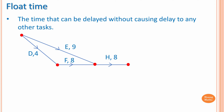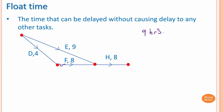Let's have a look at a section of a network. To start activity H, we need to complete activity E and activity F. To complete activity E, we need nine hours — assume these activities are in hours. To complete activity F, we need to complete activity D first. Activity F takes eight hours and activity D takes four hours, so completing D and F takes eight plus four, which is 12 hours.